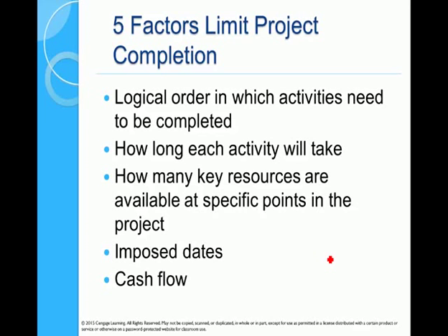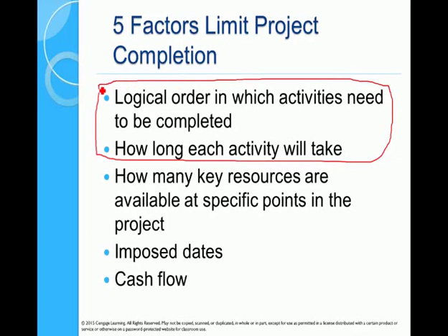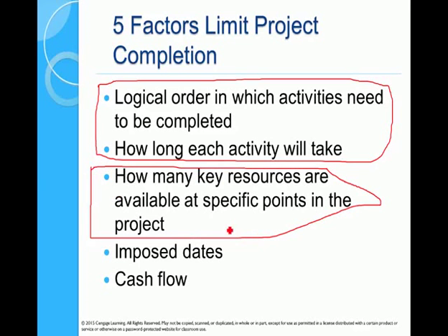So that's your basic 2 here, and that's what we're putting into the software, into the initial schedule. However, the length of activities and the order, or what the actual final schedule is, is limited by the resources that are available in the project, and particularly resources at specific points or times in the project. That can actually extend the life of the project.